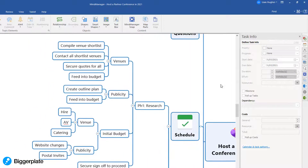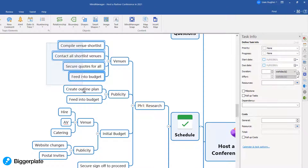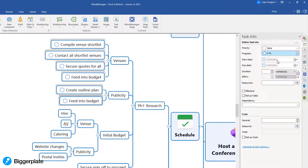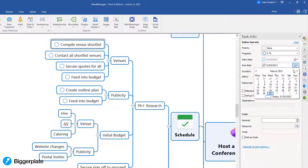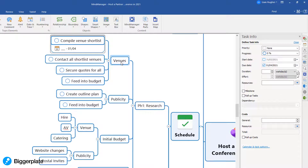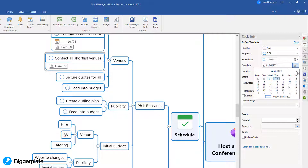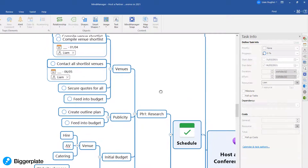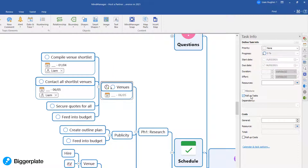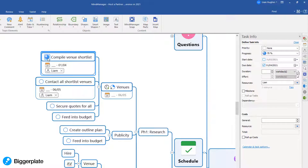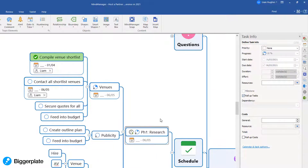In this section of the mind map we can start to leverage the task management functions of mind mapping software like MindManager to flesh out the details. We can mark items as tasks by using a completion icon, we can define due dates or periods of time when a particular task is going to be tackled, and we can assign tasks to a single team member or multiple team members. As we do this — defining deadlines, assigning tasks, etc. — we can even roll these tasks up so that they show and display progress at the higher level, so as we tick off individual small tasks we get that higher level view of how we are progressing in that phase of the project.